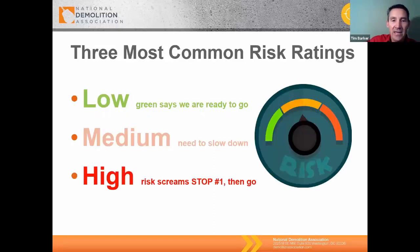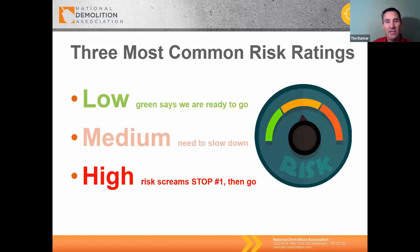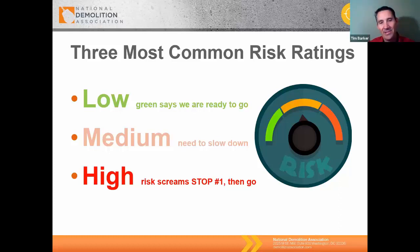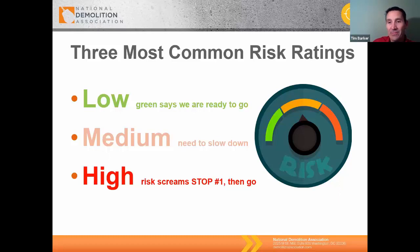Three common risk ratings — I always like to keep things very simple. On one page, can I identify what the risks are on my project and then denote if they're low, medium, or high? If it's low, we can probably live with it. If it's medium, we may need to slow down — that's the yellow light in this example. And then high — if it's red and you see danger, that's the time to stop, pause, and see if we can mitigate that risk before we proceed forward. It doesn't mean we stop forever, but we do pause. So again: low, medium, high.